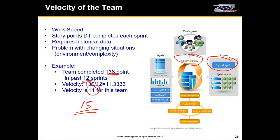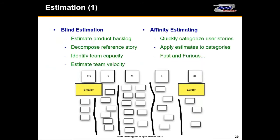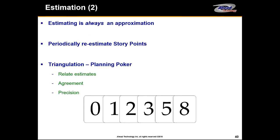If I give you a piece of work that requires a velocity of 15 but your capacity is 11, you'll say wait a minute — we need to either break it further down or it won't work. That gives you a much better estimation of your team capability, and you'll need historical data to figure this out. There are different types of estimation: blind estimation, affinity estimation, and Fibonacci estimation — also based on what we call planning poker. With planning poker, I give four or five team members a deck of cards and ask each to estimate the effort for, say, coding a certain script.